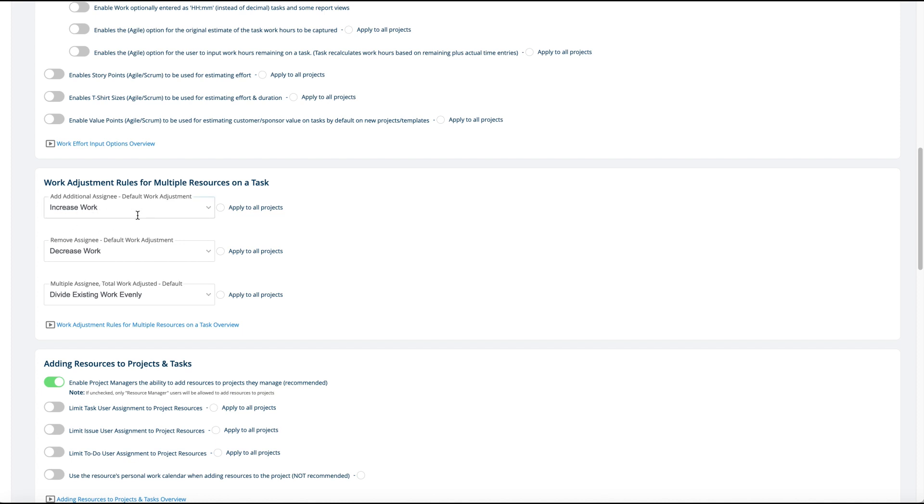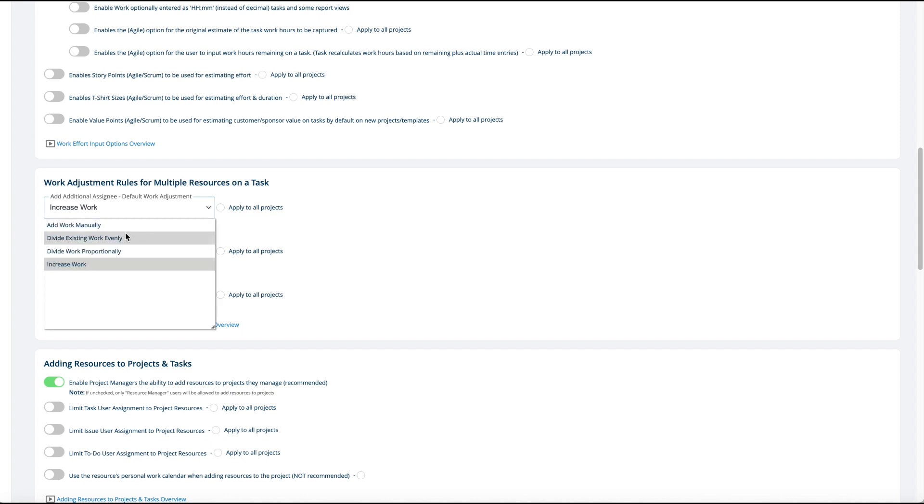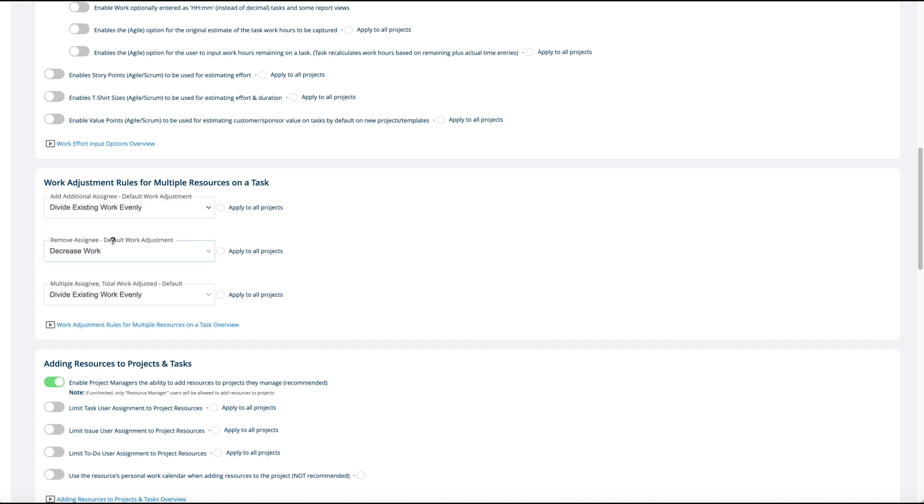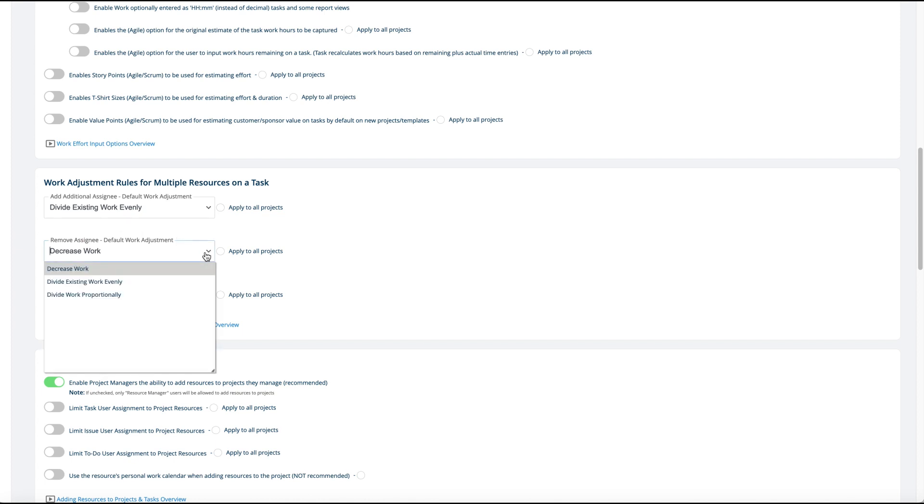But you can choose it to say if the task was eight hours and I put somebody else on the task, that I want the work to be divided between the two people. You can set that up as your default for when you add a new person to a task.